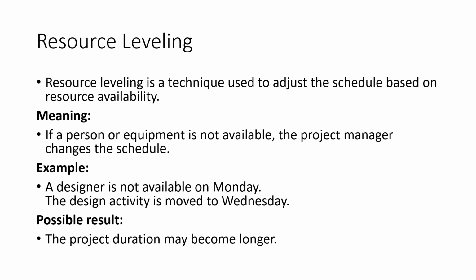Resource leveling is a technique used to adjust the schedule based on resource availability. If a person or equipment is not available, the project manager changes the schedule. For example, if a designer is not available on Monday, the design activity may be moved to Wednesday. Resource leveling helps create a more realistic schedule because it respects actual resource constraints.